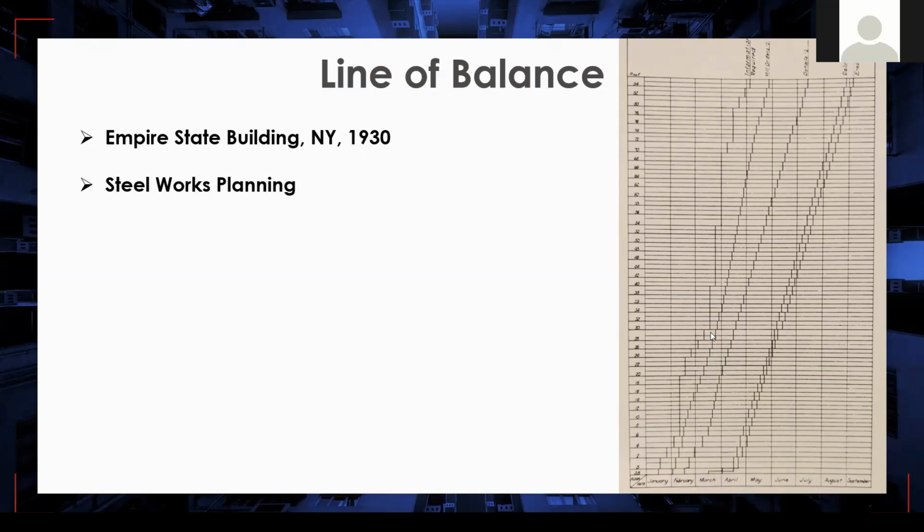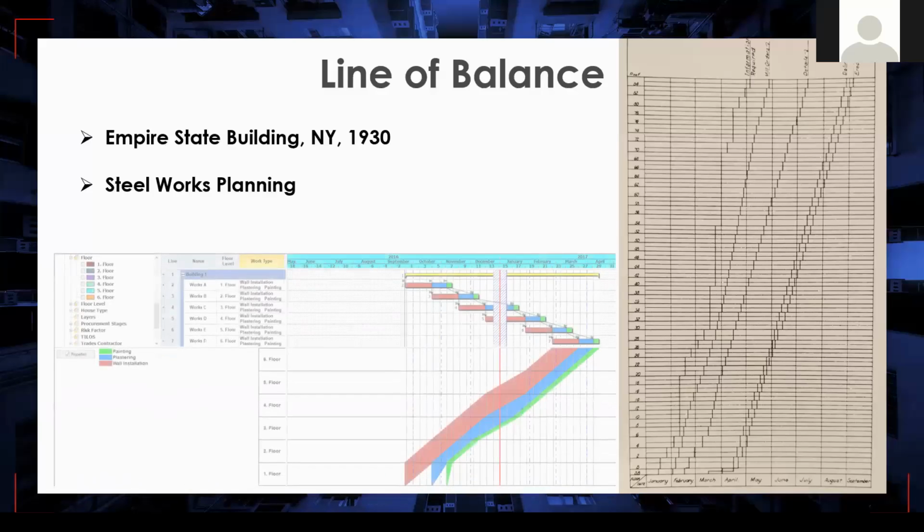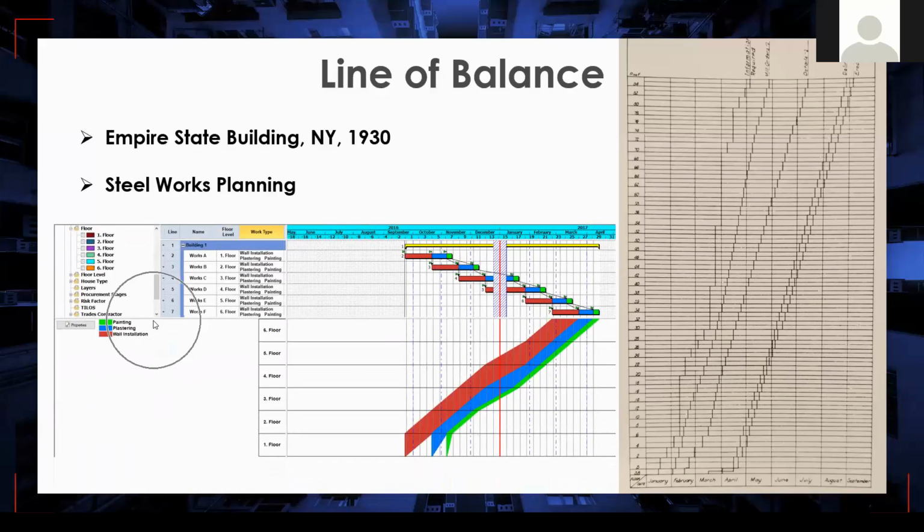We can give an instance: for wall installation, we have an activity, and after that the paint and the plaster follow. Within the sample, we have paint, plaster, and wall installation. After the plaster activity finishes, the paint cannot start. So if we have any other situation in our view, we need to correct these activity relationships.